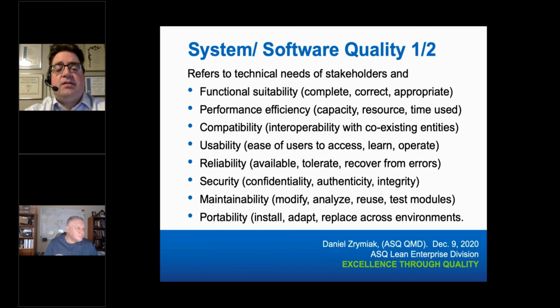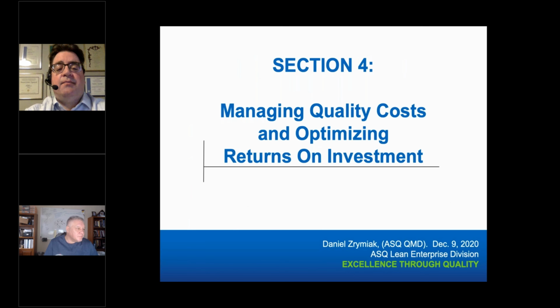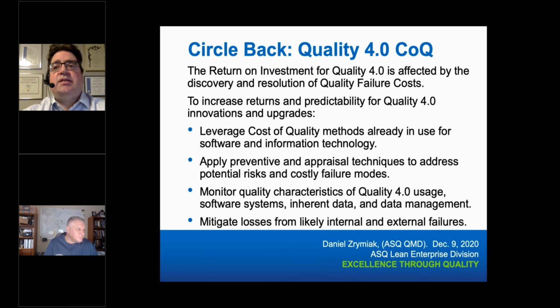Failure mode effect analysis is a very good structure in medical devices, failure mode effect criticality analysis. And I think it is very good to identify the technical failures, and then the effect is good to have it replicated as the business impact. So if, for example, the database fails, what does this mean for your business? And they say, well, we can't take customer information reservations, which then inhibits the customer transactions.